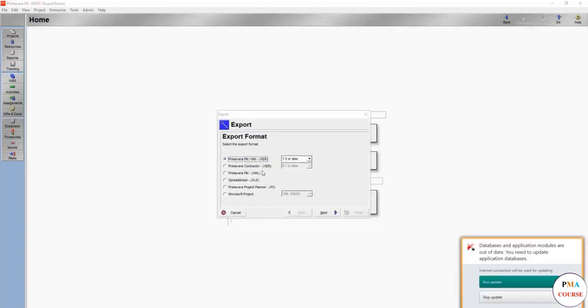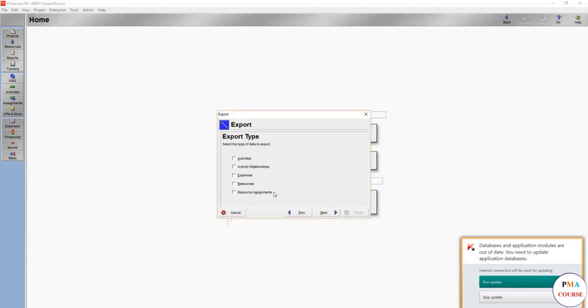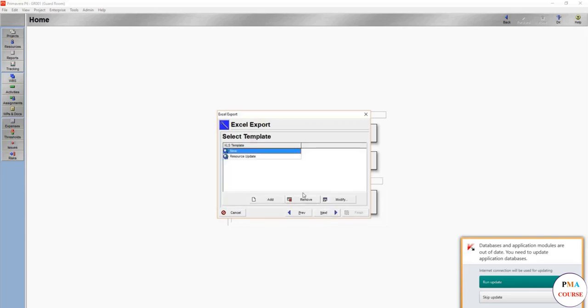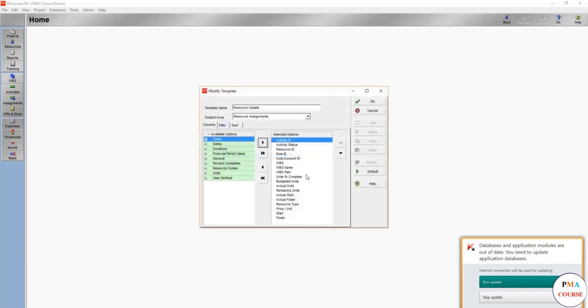First, you'll go to Export, then you will choose Spreadsheet XLS. You choose not Resources - you need the Resource Assignments. Then you choose the entire project.